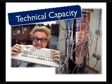The last part of our assessment is technical capacity. So adopting an EHR means that the tools that you have, you must be able to work with the requirements of an EHR. So this is where we get pretty concrete in our assessment. We're going to be looking at the capabilities of your current IT structure, things like computers, printers, physical layout, networking, service, wireless strength, bandwidth, all those great things. The ability to adopt an EHR is going to rely heavily on your infrastructure, because I think we all know if your system goes down at 3 o'clock at change of shift and heavy users are signing on, this system will not be adopted because they don't have confidence in the system that it's reliable.